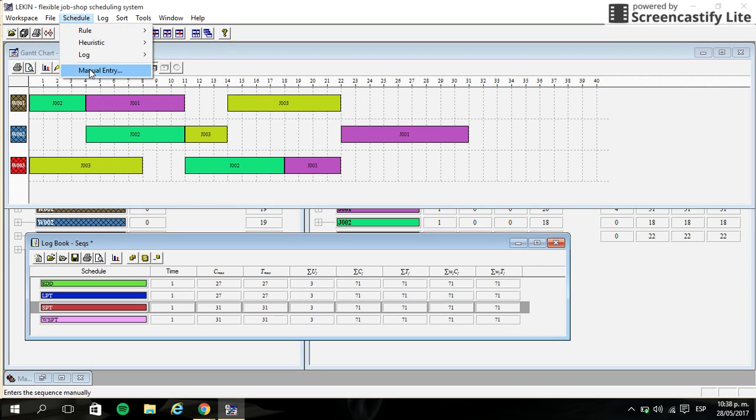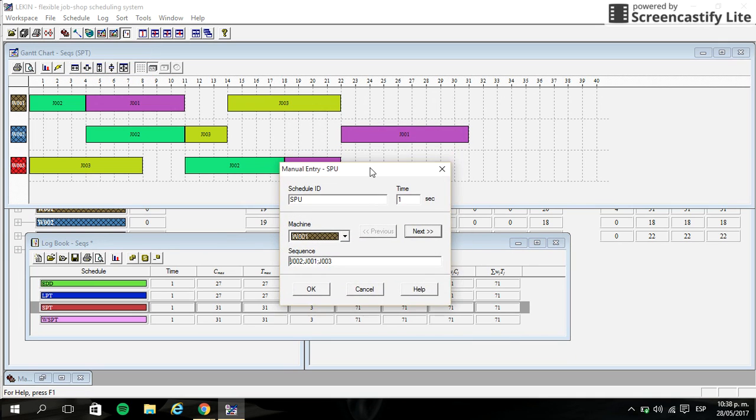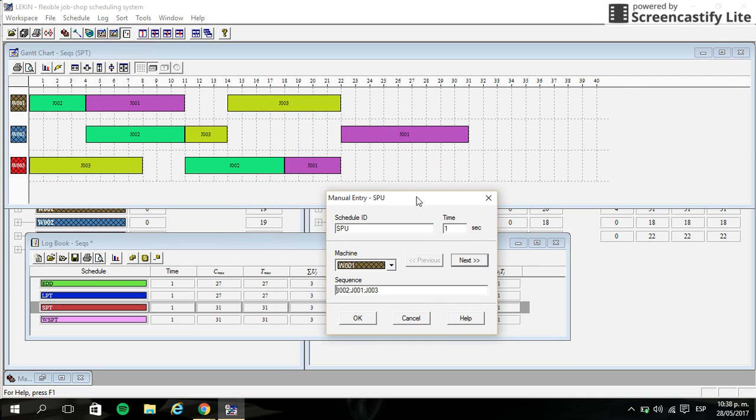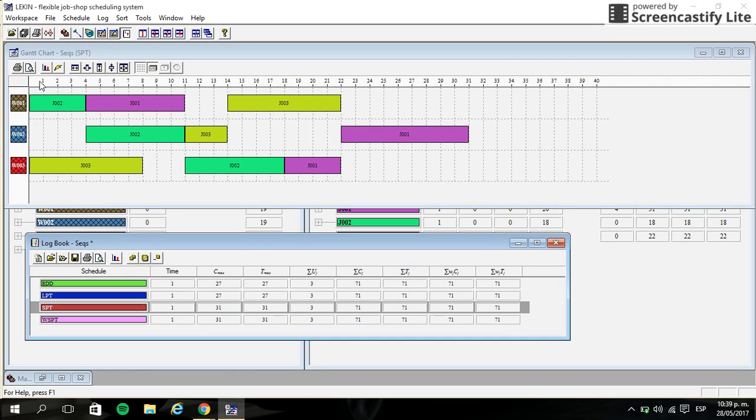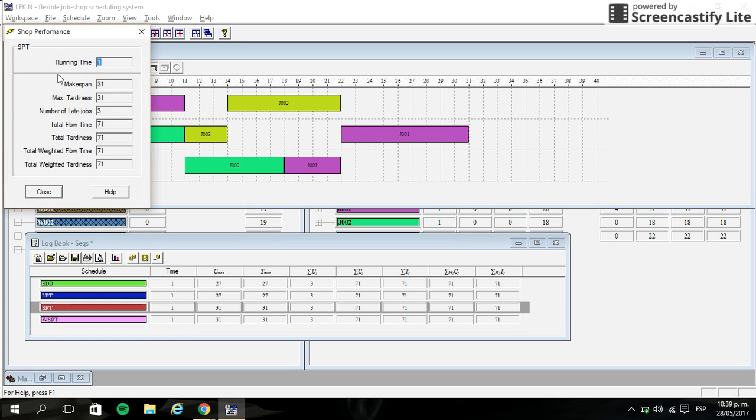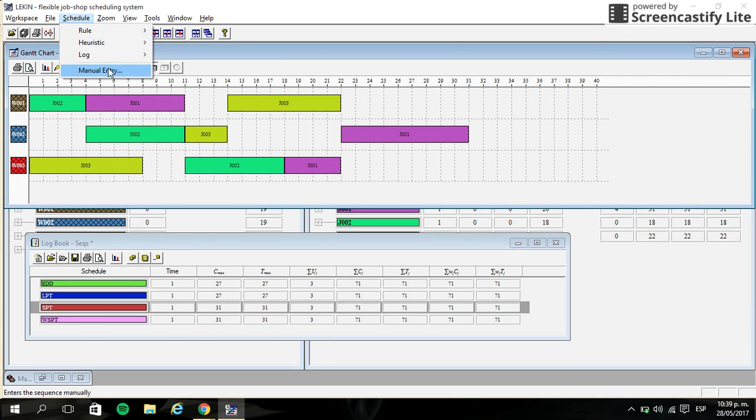We can do a manual entry to do something in the Gantt graph to reduce something like makespan. We can see that makespan in this case is 31. You can check it by clicking here in performance and see the maximum, okay, 31. So we can change something in the sequence to reduce this makespan.